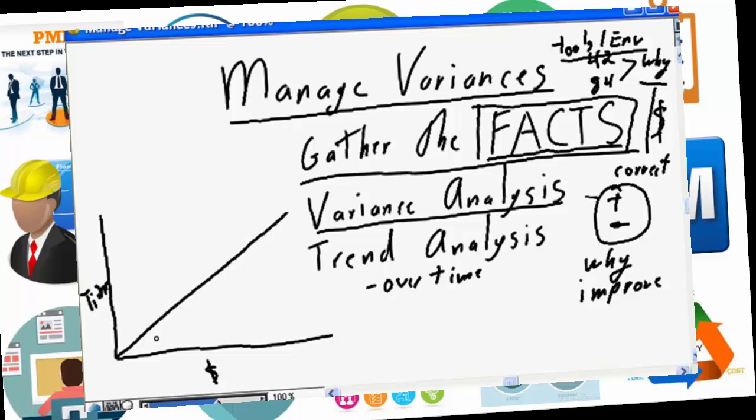Then you're going to plot your actuals against your baseline. And let's say we're starting off that our actuals are trending below our baseline. A very good situation, and the actuals are following a parallel path to the baseline. Does this mean that our project is going to deliver under budget? It may mean, but as you're doing your trend analysis and doing this over time, all of a sudden you realize that it's trending upwards. And we have now passed the baseline, and it may be that the project is heading for trouble.